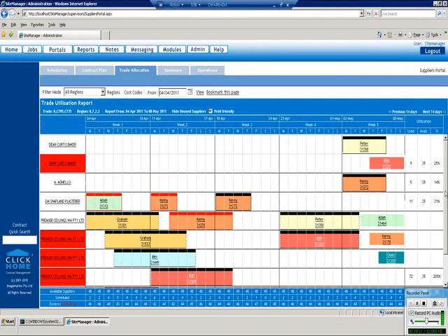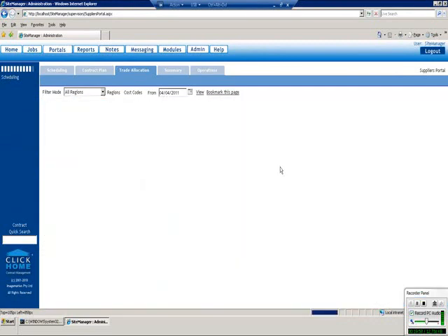So I was talking about the surrounds, and you'll see that if it's a solid black surround, I'm able to move the plan date of that task. So I can move when that task is planned to. Just to recap, I've just clicked on that task, and I can just drag it across to there, and you'll see the icon will go into a cross. Right. And I am then able to drop it, and that will go and reschedule that task.